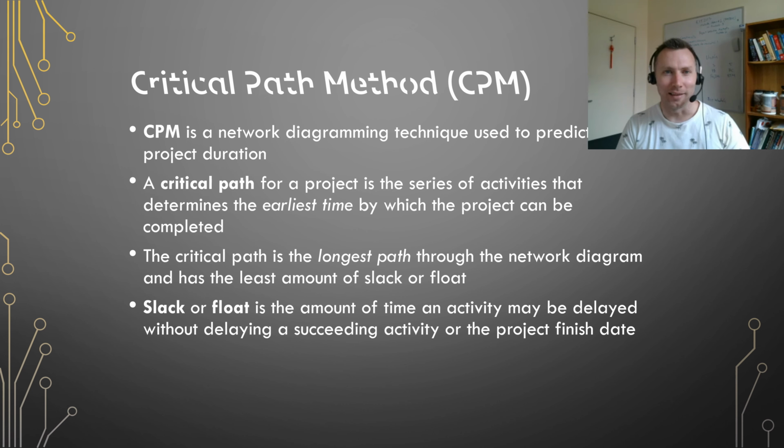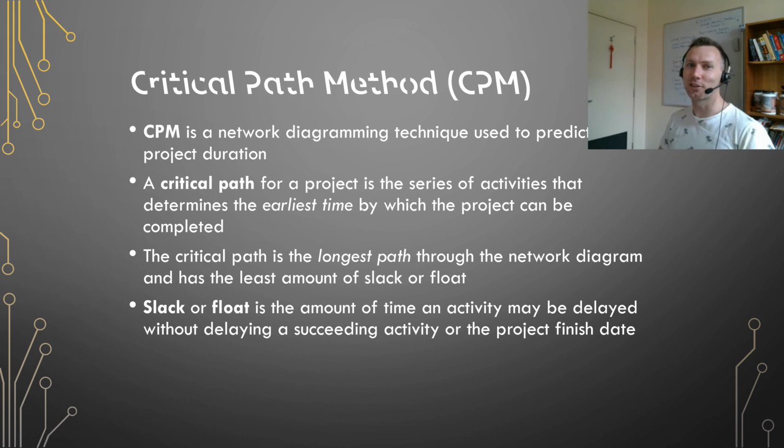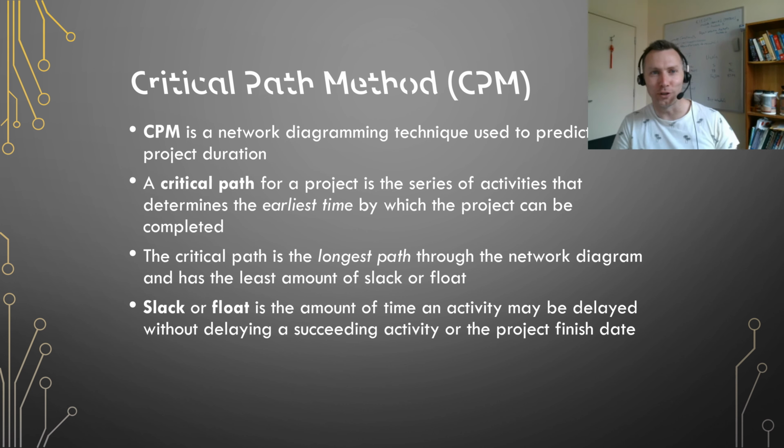Your critical path is the longest chain of tasks throughout your project. These tasks will determine the length of your project. The project cannot be finished until all of the tasks on the critical path have been completed. It is the longest, but not necessarily the most important path through the project. There is no slack or float time on your critical path.